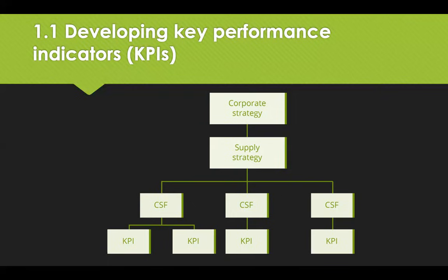Those KPIs should fulfil the following requirements. They should be aligned to your service delivery goals, i.e. your critical success factors. They should be in context of what you're trying to achieve. And they should create meaning at all organisational levels. And finally, they should be SMART, in the sense they should be specific, measurable, achievable, relevant, and time-bound.